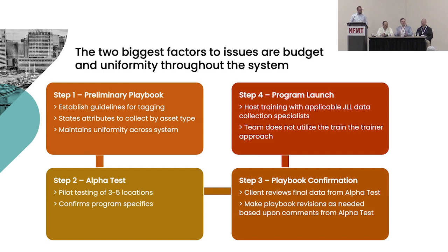I'll be honest, whenever you go through the design and construction of a building, even if you use commissioning agents, even if you scope it into your documents, even if the general contractor knows they have to do it, when it comes time to invoice, they're like, I don't have the manpower because I didn't know I had to take all of that. I couldn't just give you the drawing. I didn't want to have to put it into a spreadsheet that can actually work with your CMMS system.